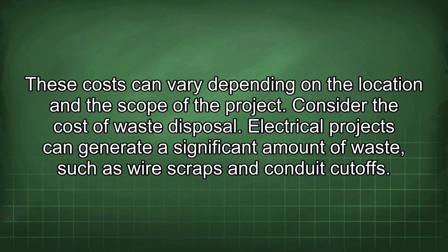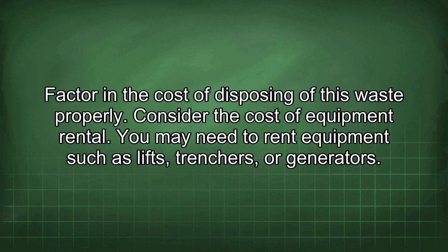Factor in the cost of permits and inspections. These costs can vary depending on the location and the scope of the project. Consider the cost of waste disposal. Electrical projects can generate a significant amount of waste, such as wire scraps and conduit cutoffs. Factor in the cost of disposing of this waste properly.